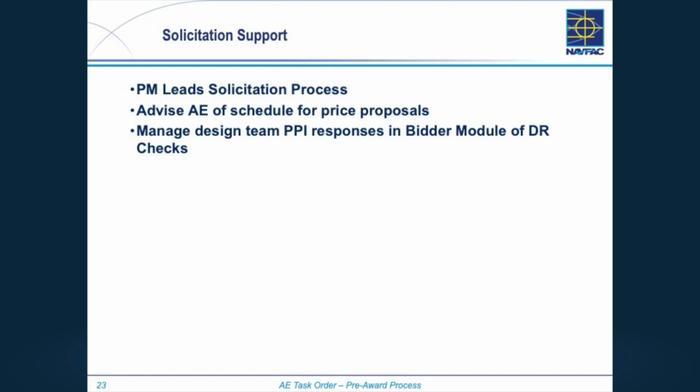At that point in time, if you didn't pre-negotiate the PCAS for this project and now it's going to be awarded, and you're going to need the DOR on the job to be there for construction, this is when you write up your statement of work for PCAS services, price it out, and send it to your PM so that you can start getting that in place. Because once we award this construction contract, the clock is ticking to get it started and move forward. And we can't be waiting 90 days to negotiate PCAS with our architect when we knew it was coming.